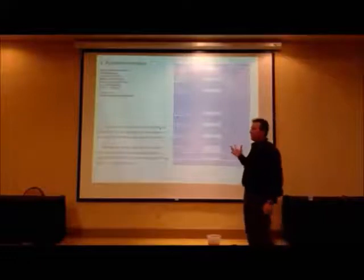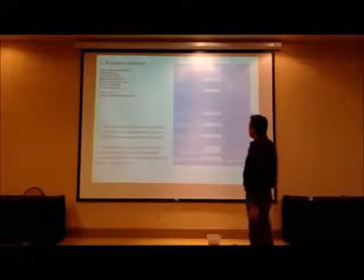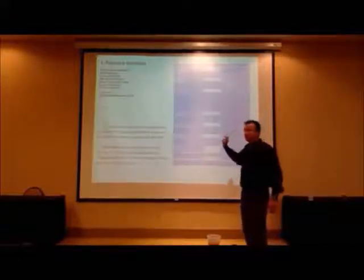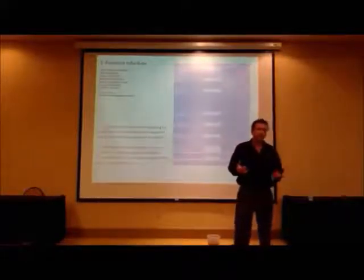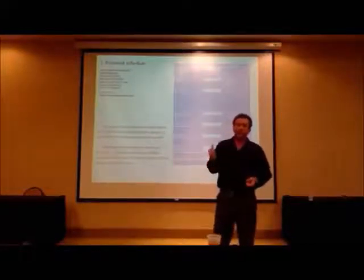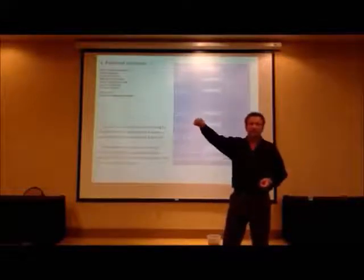This is the payment schedule. And this is where you put the amount that he's to get paid and how many draws. Typically, if it's a pretty big project, we're doing 4 draws. The last draw should always be much larger than the other 3, because you want to have that carrot dangling at the end of the stick for him.